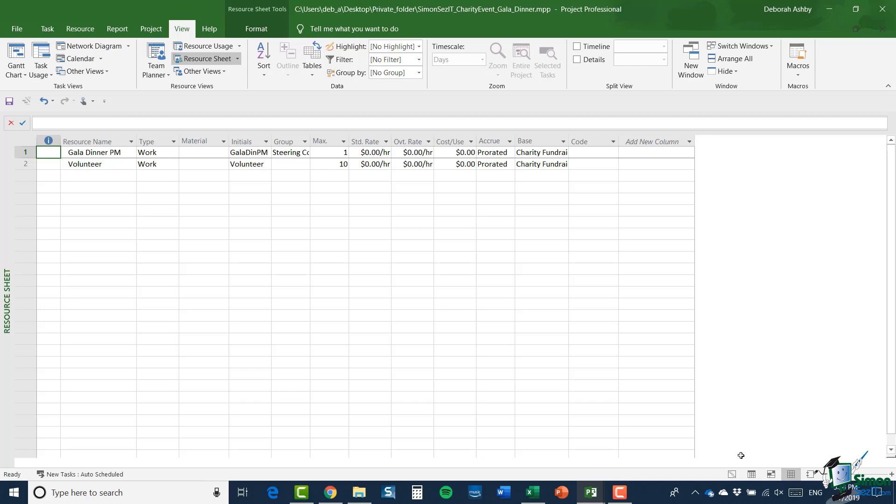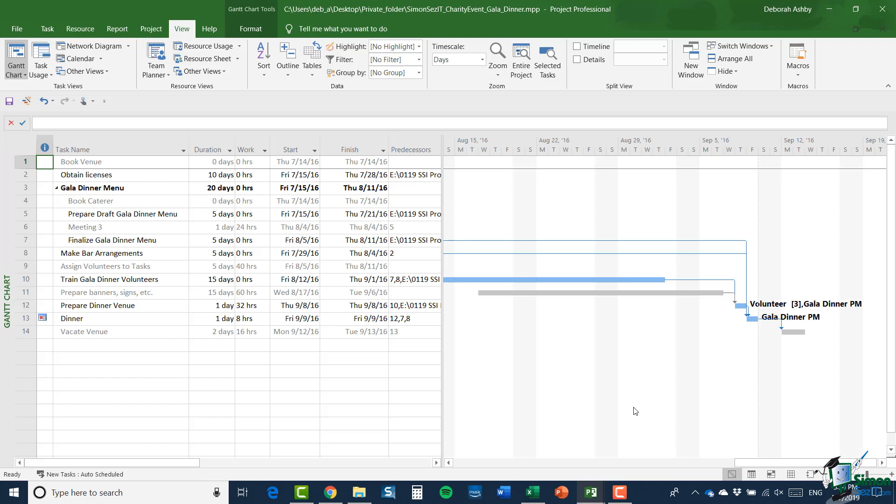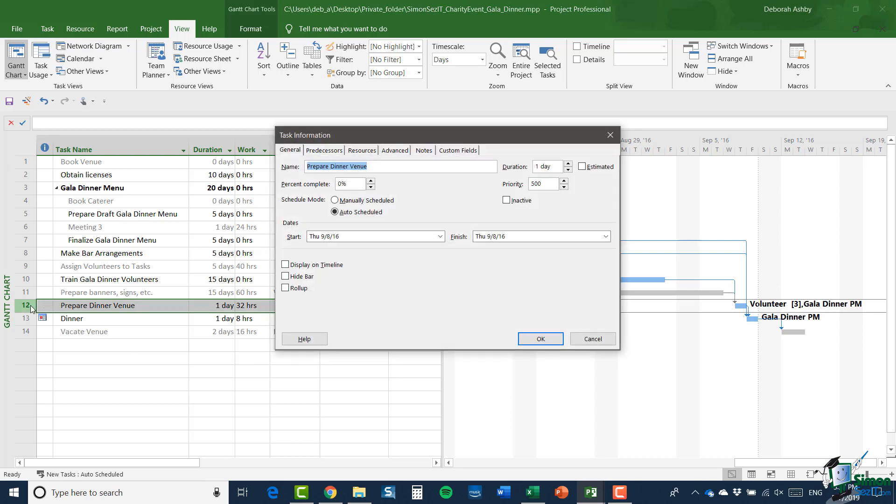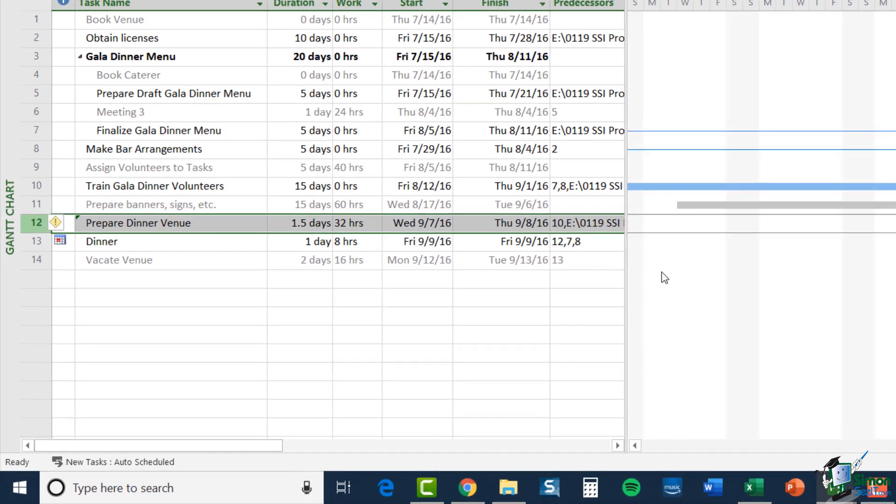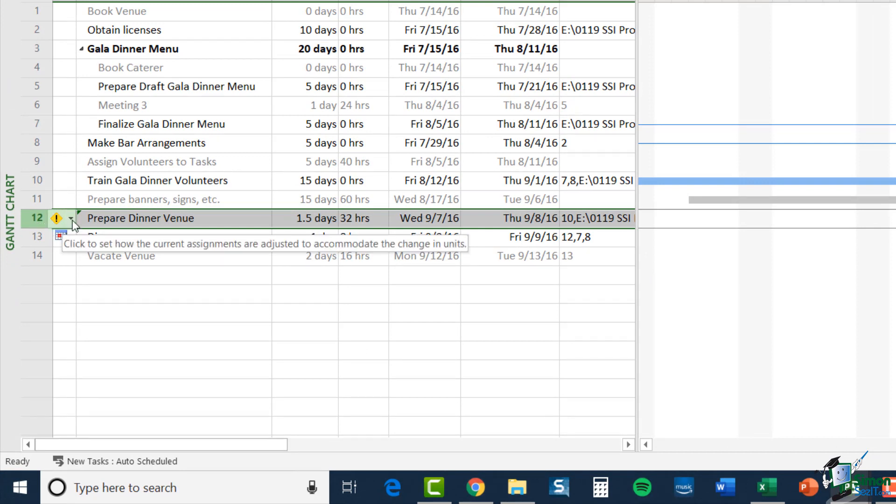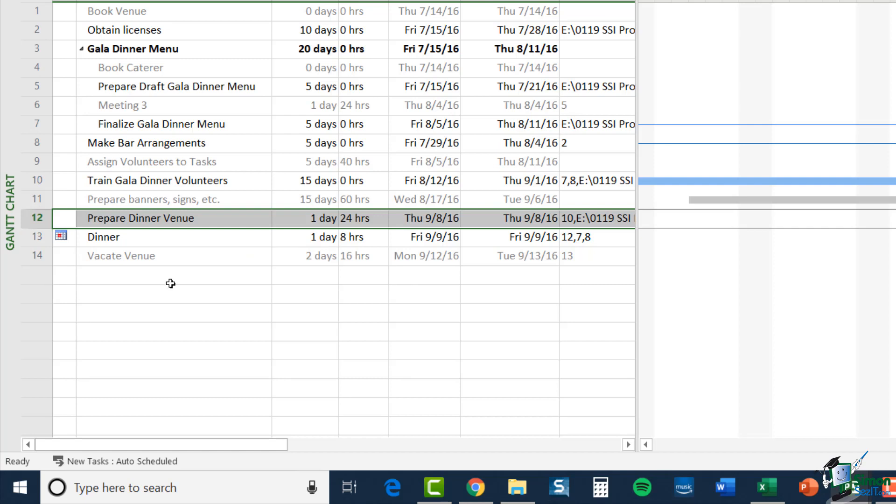So, I could change assignments. So, let's jump back to the Gantt chart and let's look for instance at prepare dinner venue and let's look at the resources and let's change that from three units to say two and click OK. Now, notice the warning just there. Check to see how the current assignments are adjusted to accommodate the change of units. So, if I click to get my options and I'm going to select the third option change the amount of work but keep the duration the same. And that's now fine.